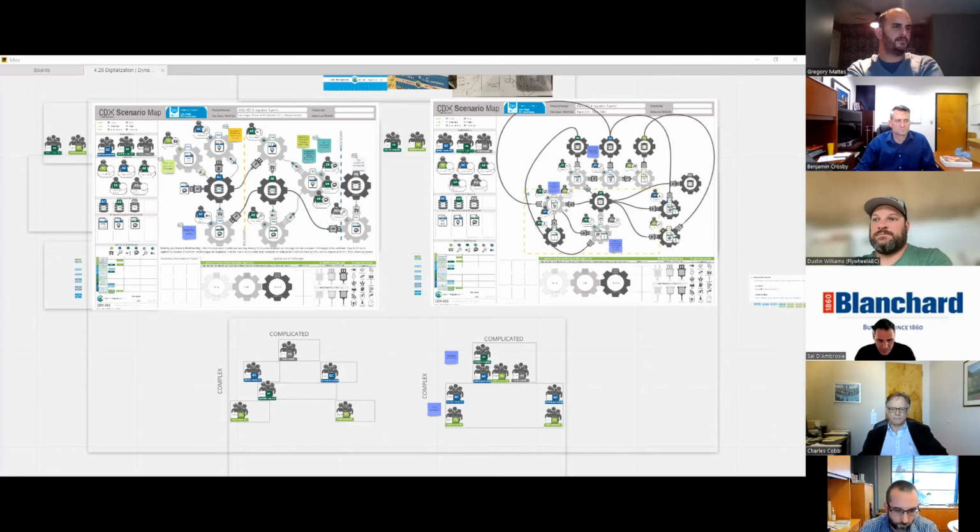I feel like whichever system you're using, there's got to be a means to identify, hey, this is actually a critical RFI that needs to be responded to because it's going to hold us up from putting work in place. Or we saw something in our drawing review that we might need some clarification on, but you can just pin it up there for now and address it later. And that's where it's all about communication. You've got to talk, right? You've got to ask, hey, is this a critical RFI? Okay, then we'll try to get it done.